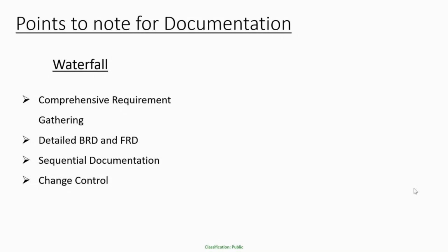You should be aware of this particular change, right? So you need to have formal documentation which is assessed for impact and has proper approvals from stakeholders and others. Okay, so that is change control. Be sure that this is in place.